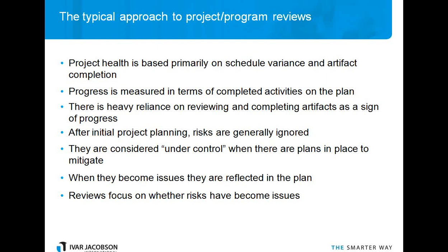And the problem with that is that the plan, when it's developed, is based on very little information. This is before the project is really even started, before much in the way of needs understanding and requirements have been understood, perhaps before the solution's really even been defined. So it's a guess at best. And when that gets locked in, the expectations are set and progress is measured in terms of completing activities on the plan and then measuring to see whether the activities were completed on the dates that they were